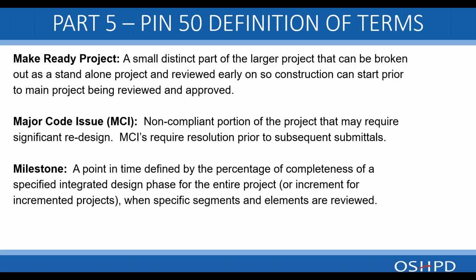Major code issues, these are the big alligators that typically, if review continues, could possibly change the design and require a re-review. This is a non-compliant portion of the project that may require significant redesign, and this requires resolution prior to subsequent submittals.